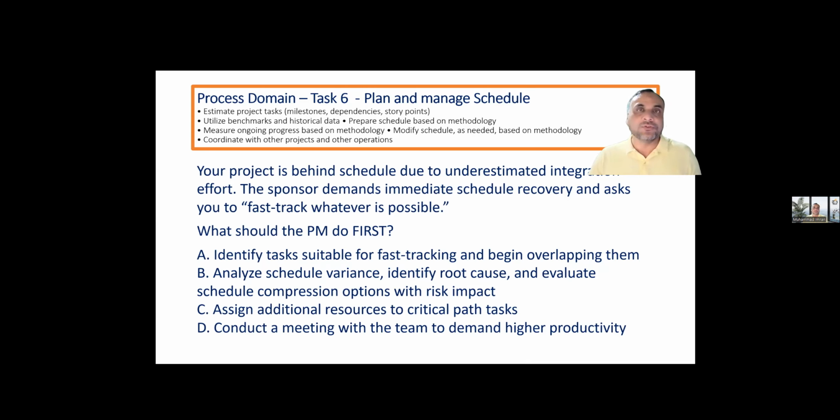If our project schedule is not in control, we can perform compression by fast tracking or crashing. Crashing means adding more resources, so surely the cost will be increased. Fast tracking means doing the activities in parallel, which means our risk will be higher than the cost of the resources. So we need to understand when to perform crashing and when to perform fast tracking. If resources are overloaded or you are in trouble, you can perform leveling to avoid burning out the resources, where the critical path will change. Or you can use smoothing, where if you have floats available, you can adjust with the floats.